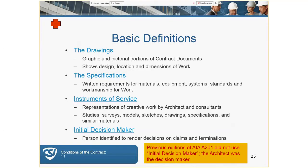Some more basic definitions: drawings and specs are somewhat self-explanatory. The initial decision maker is a relatively new entity within the A-201, set up for impartial claims resolution. It's commonly defined as the architect, but it might be an impartial third party — someone all parties agree to with significant related project experience.